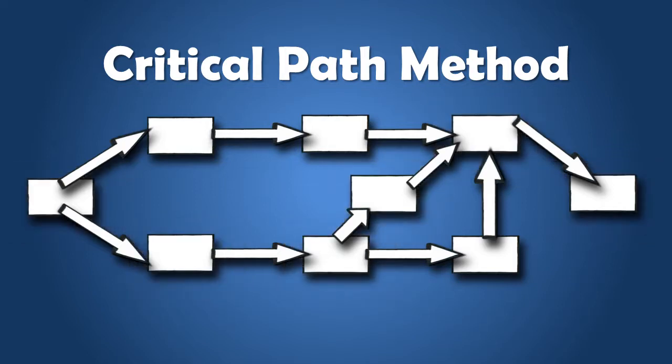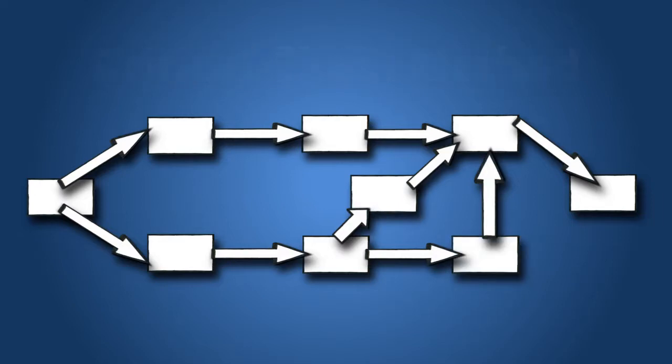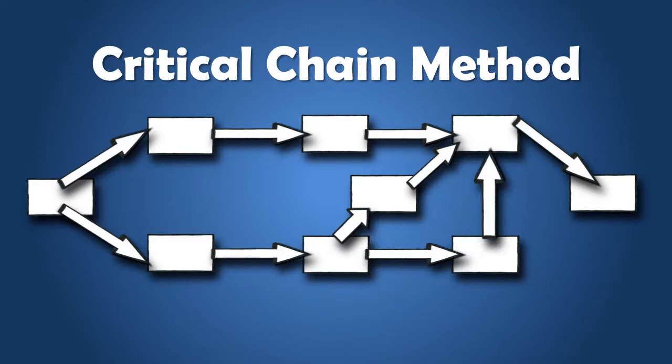There are three main reasons why it's important to understand and identify the critical path. The first is to determine the project's finish date. The second is to identify how much float there is in each activity path. The activity float helps determine how much an activity can be delayed without upsetting the project deadline. And the third reason is to identify those activities with the highest risk and those that cannot slip without making the entire project late.